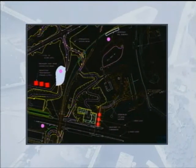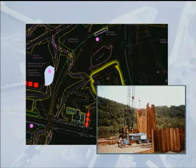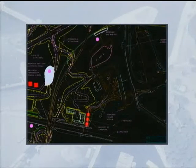One of the first areas scheduled to receive dry excavated material is Taylor Park Campground. This will permit development of a relatively large level area suitable for staging and laydown. The lower levels of Taylor Park Campground are reserved for sheet pile storage, cofferdam template fabrication, and related marine activities.